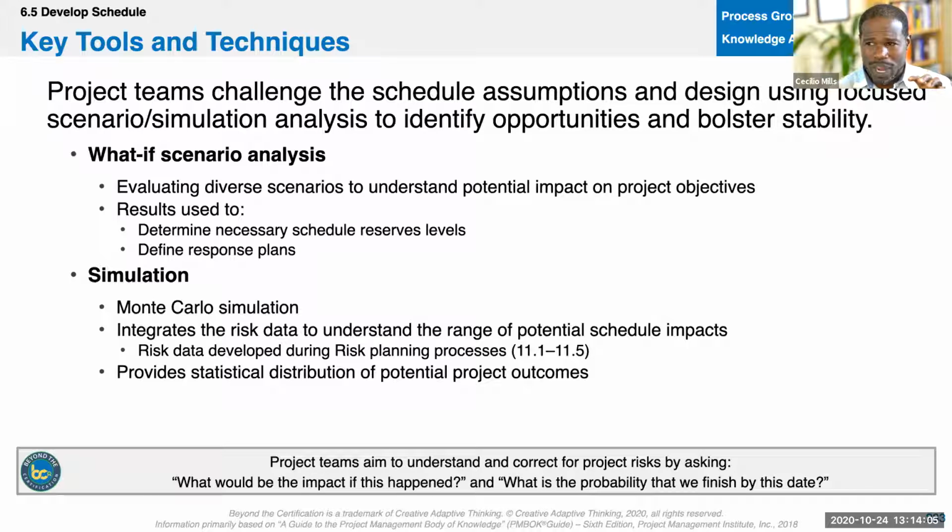In October, we have these days where it can get up to 85, 90 degrees, but then at night it can drop and be pretty cold. Well, when you have these fluctuations in temperature, it can cause stress, and it can cause the tensile strength won't be there. So the integrity won't be as good. So they'll run Monte Carlo to see, should we use fast set drying concrete, which is a lot more expensive than regular, but will help us not have to rework and break it up.